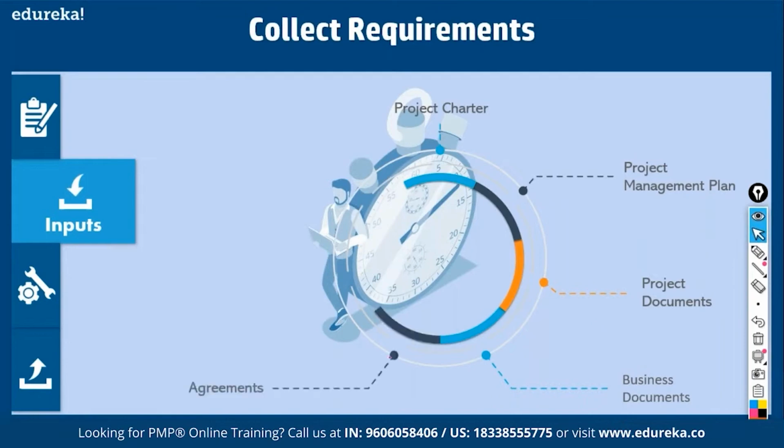Then agreements, what are agreements? Agreements are the agreements that you enter into with the customer. When you get a contract, let's say you're ABC company, you get a contract from XYZ company to deliver a product. So the customer would have entered into an agreement with you. The agreement would contain a statement of work. What is a statement of work? A statement of work is a narrative description of everything that you, ABC company, must deliver as part of the project. So it contains all the requirements. So you look into agreements as to what you have to deliver. That will be the basis for collecting requirements. You have to go and talk to the stakeholders based on this statement of work and amplify the requirements in a much more detailed manner.